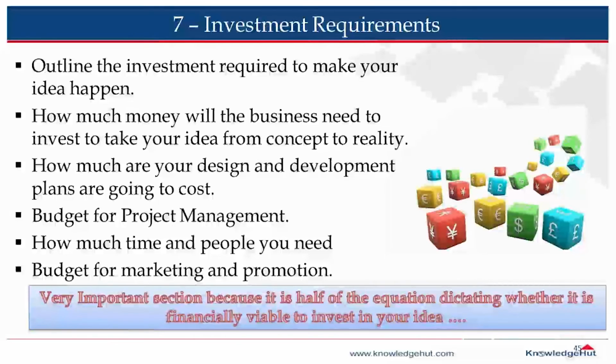This is the key. These are some of the key items which will seek your management's or your approver's attention, and you clearly say how much each phase of your project is going to cost, the budget for project management, your time and resources, and the budget for marketing and promotion. So this is the investment requirement.